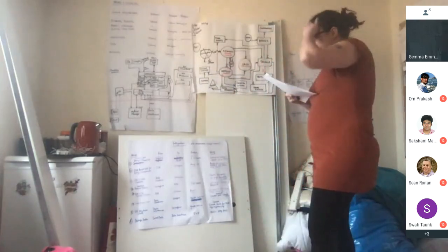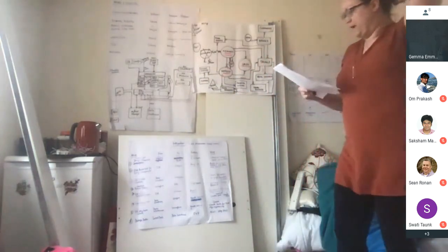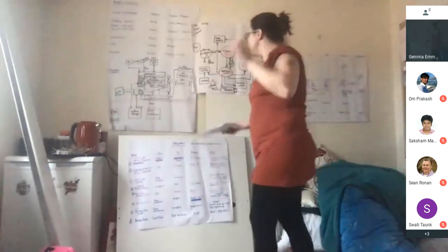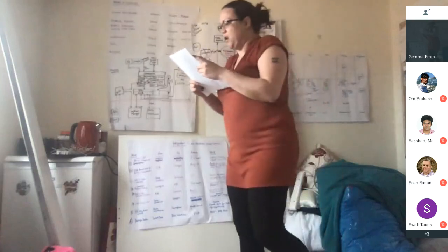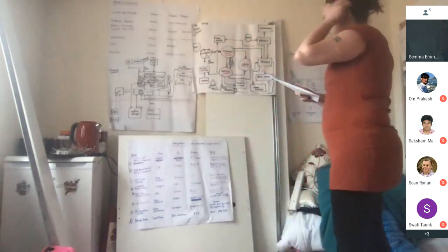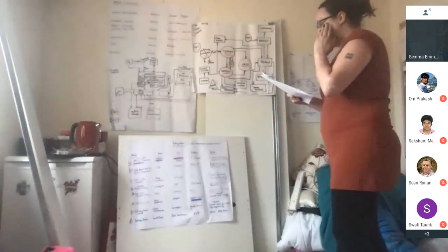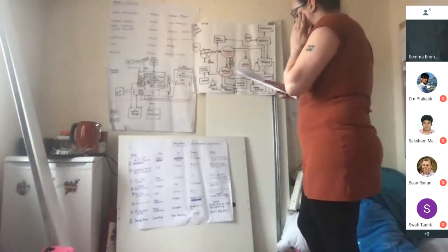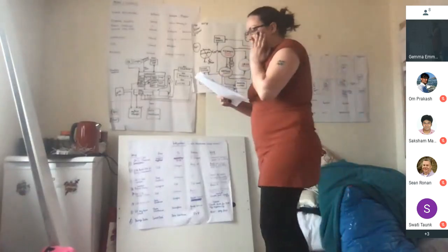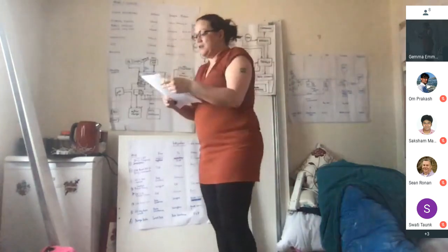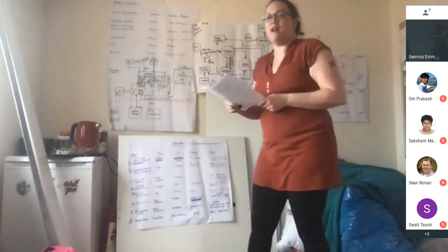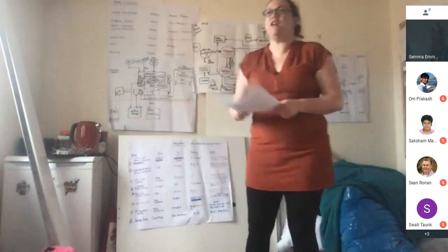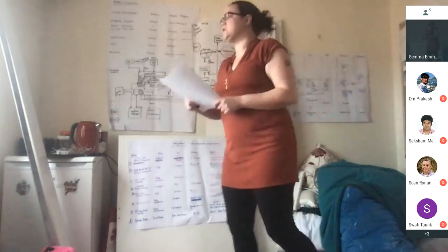Outside of the mission critical systems, which are basically my trial manager and smart dose, because they're mission critical, we can only really update them once or twice a year, and anything that we interface with these systems needs extensive validation. Canvas apps shouldn't be a risk necessarily because we're not changing anything on the other side. We're just exposing it into Salesforce.